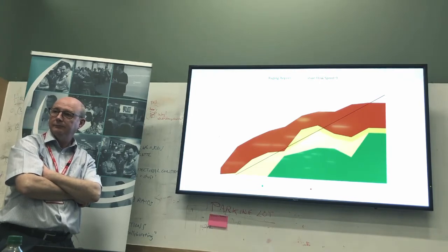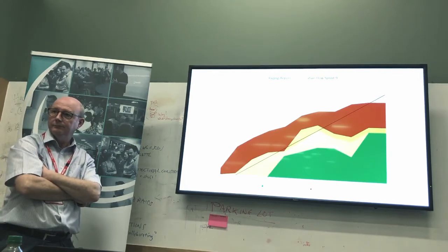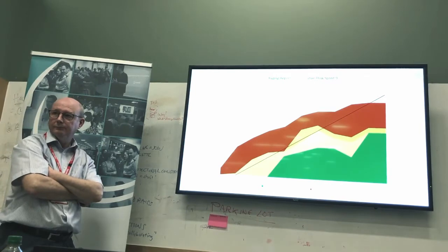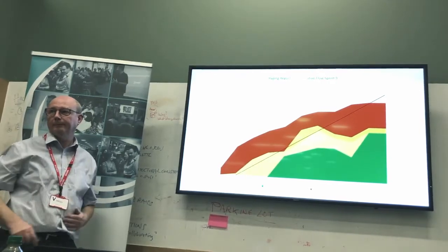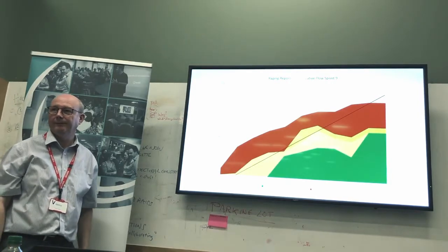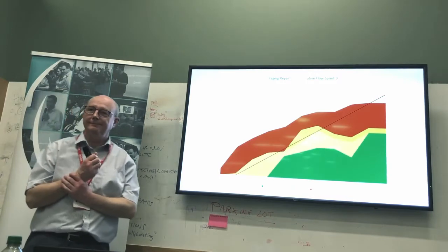If someone is accepting done, they're saying, right, this isn't acceptable for what we want. But a team should say, when we're done, this meets our quality set of definition of done. So in our mind, this is done. If you want it rolled back, or things that say release, then fair enough. But in our eyes, it is done.